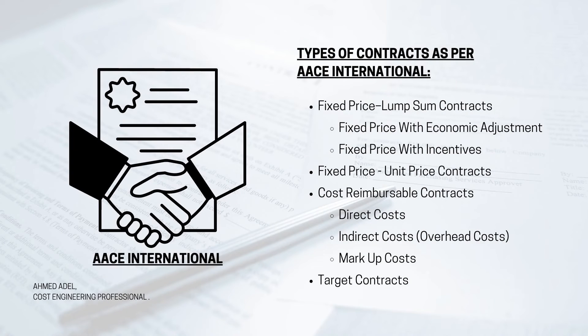The threshold percentage must be agreed upon and written into the contract. If the price changes by that percentage or more, the difference in cost for that specific supply item will be added or removed from the contract price. This is the economic adjustment — because metal prices like aluminium, copper, and steel keep changing every month.